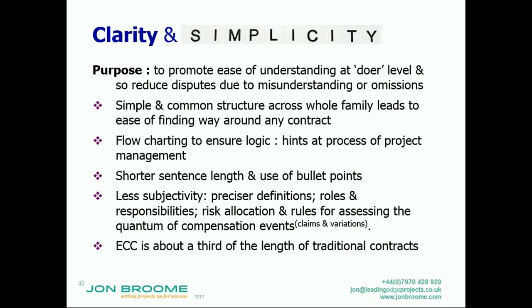So preciser definitions or defined terms, preciser roles and responsibilities, who does what by when, preciser risk allocation, as in what is an extra, what is a claim and variation, preciser rules for assessing the quantum of compensation events. So as I put a little reminder, claims and variations in old speak. And it's also about a third of the length of traditional contracts. So there's much more brevity.